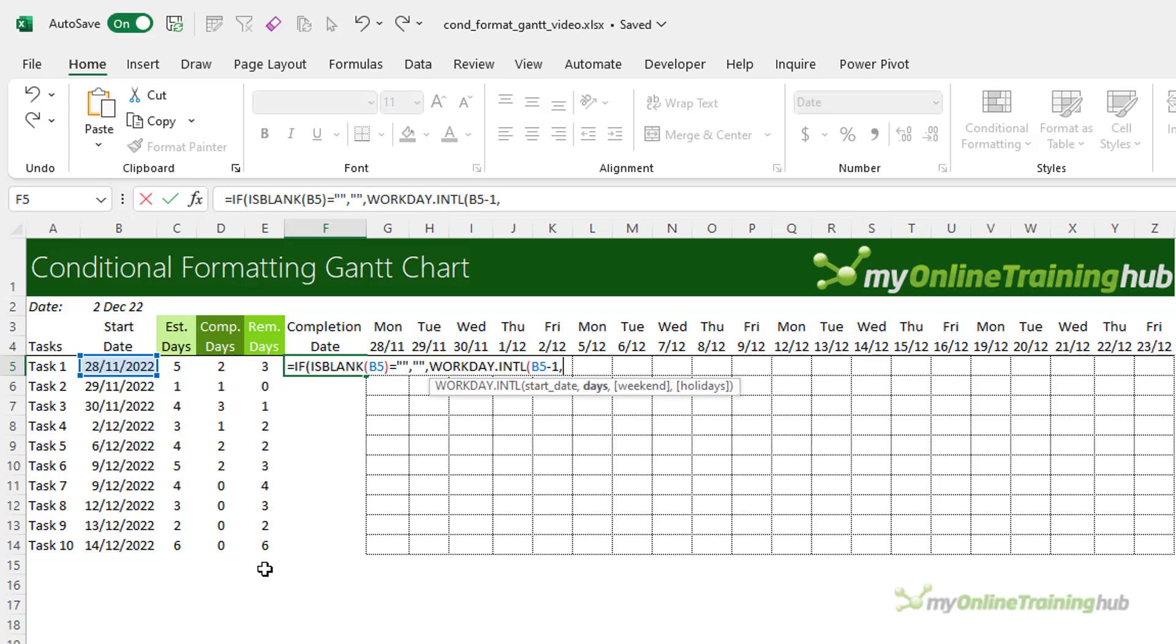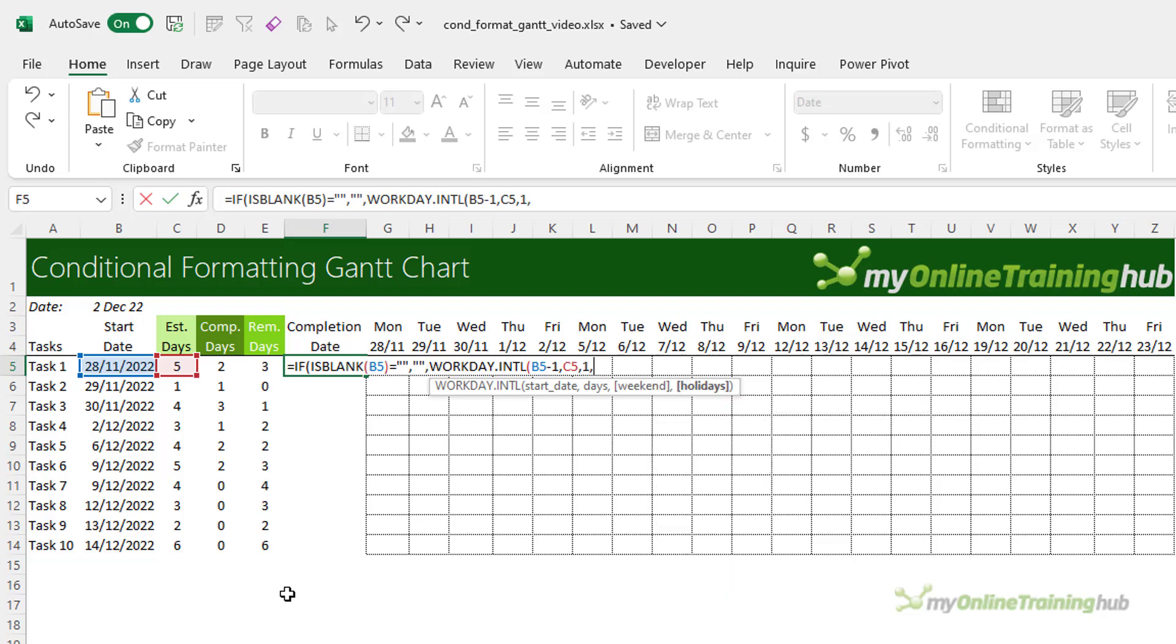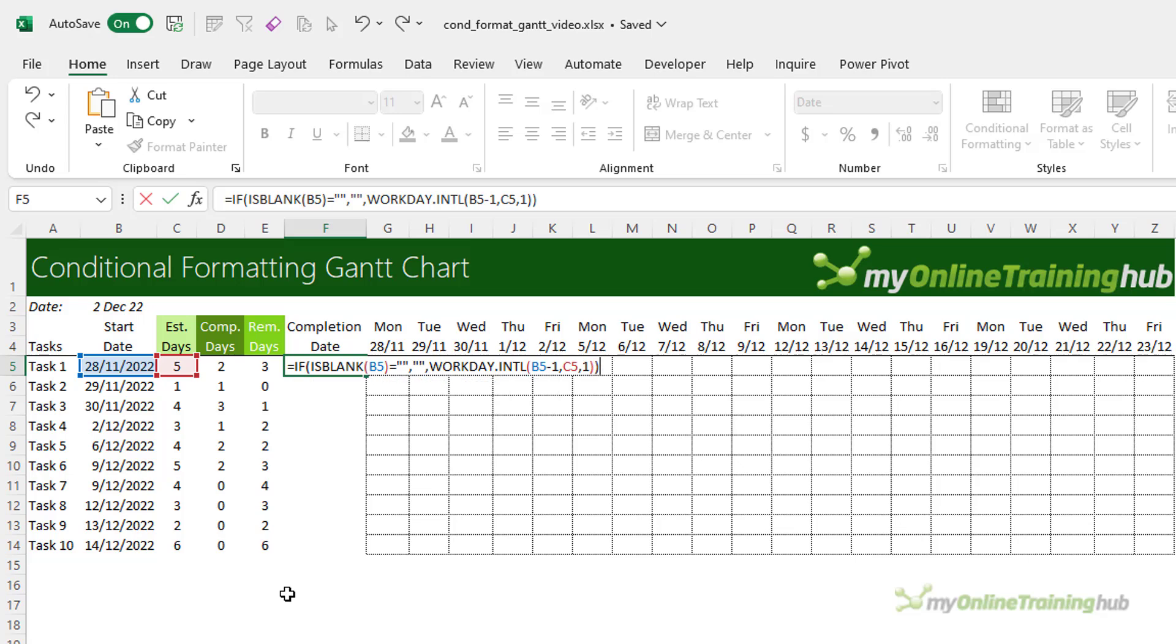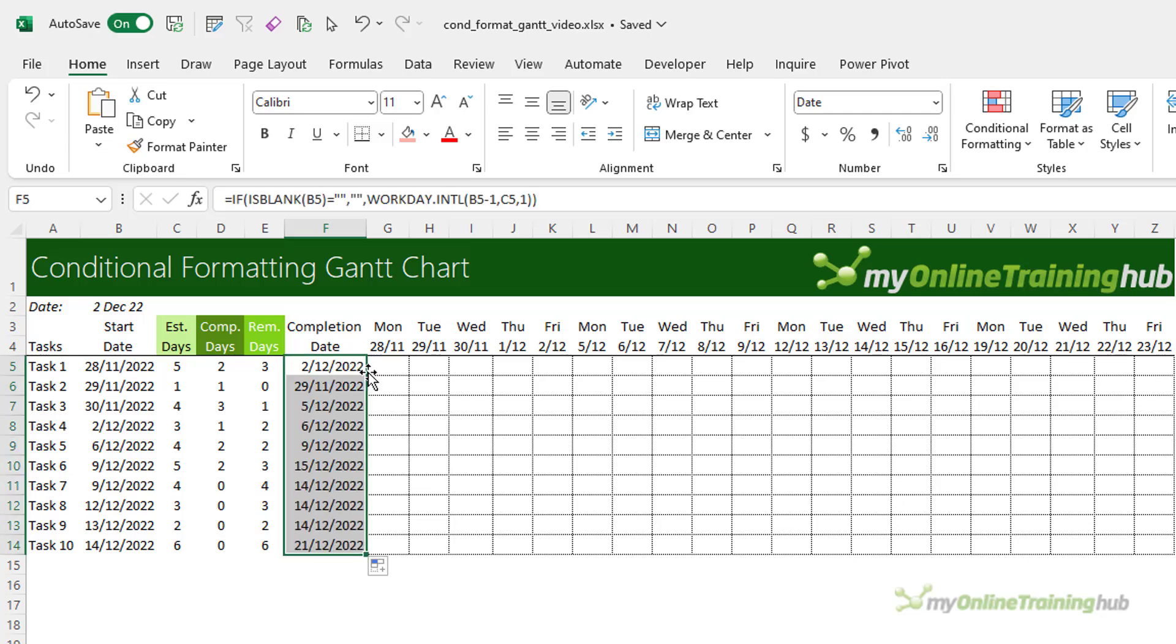And then how many days am I adding? Well, the estimated days. And then my weekend falls on a Saturday and Sunday, so I want number one. And then I can add a list of holidays. I'm going to leave that blank. But if you have a list of holiday dates, you can reference them here. Let's close parentheses on WORKDAY.INTL and close parentheses on IF. And there's my completion date. So I'll just double click to copy that down.